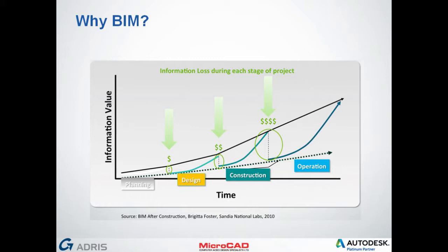a planning stage. Something's being very swiftly designed, it's going into planning, some of that information is getting lost and redrawn, going through a design stage, again some of it goes into building regulations, and again some of the information is getting lost, having to be redrawn, and then there's the construction stage and so on. So that step down each time, the information being lost each time, suggests that each time that loss is applied, there's also a loss of time and money, for people having to redraw and redo all of those things again.